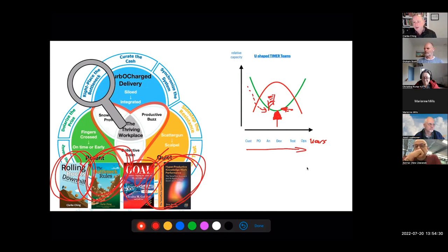When you flip it over the other way, and most teams are shaped like this nasty red shape, they actually have far too many developers. And I say most teams, I'm not making that up to sell this idea, it's just true, but most teams will fight that and disagree with it because they look and see that their developers are really busy. And the reason that the developers are really busy is usually that the people upstream of them are busy trying to keep them busy. They're busy looking at stuff and going, how can I feed stuff?